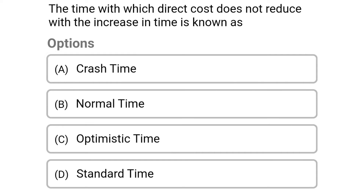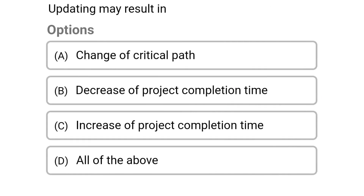Next question: the time with which direct cost does not reduce with the increase in time is known as — option A: crash time, option B: normal time, option C: optimistic time, option D: standard time. The correct answer is option B: normal time.